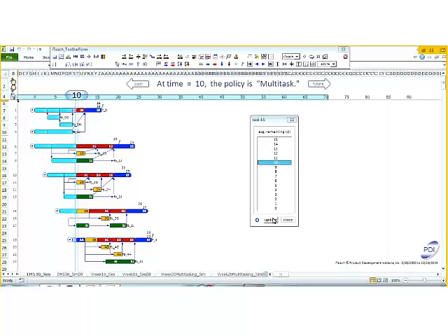Reese also points out that when you're multitasking, you've got the spin-up time. So every time you do a task switch, in a real environment, you lose a lot of capacity due to the task switching. Even in the simulation, it just gives you trouble. There's a lot of stress involved with all the task switching.